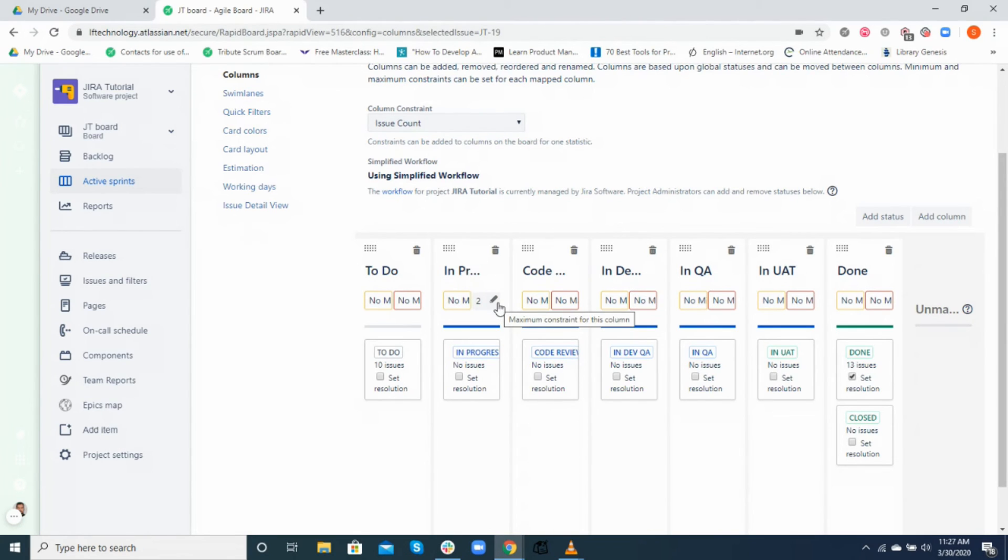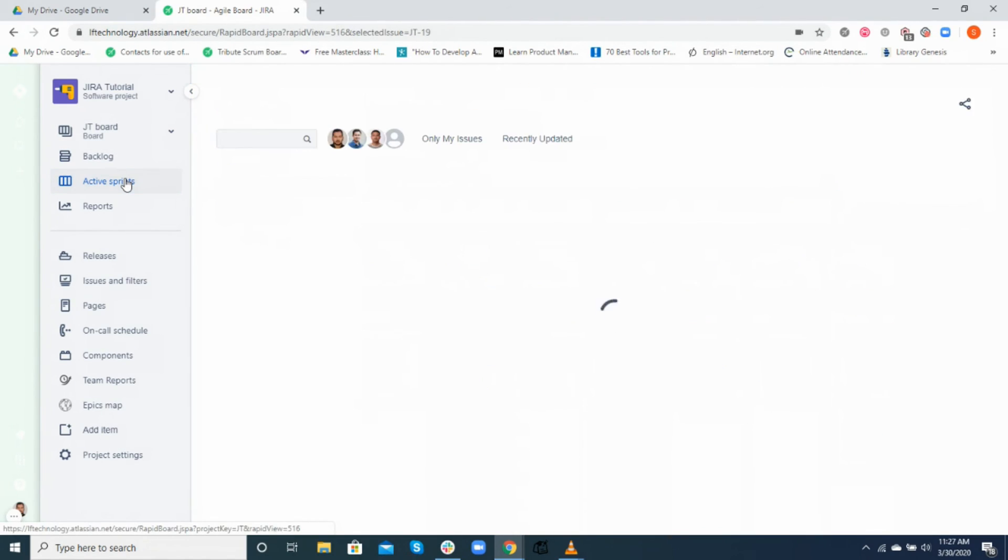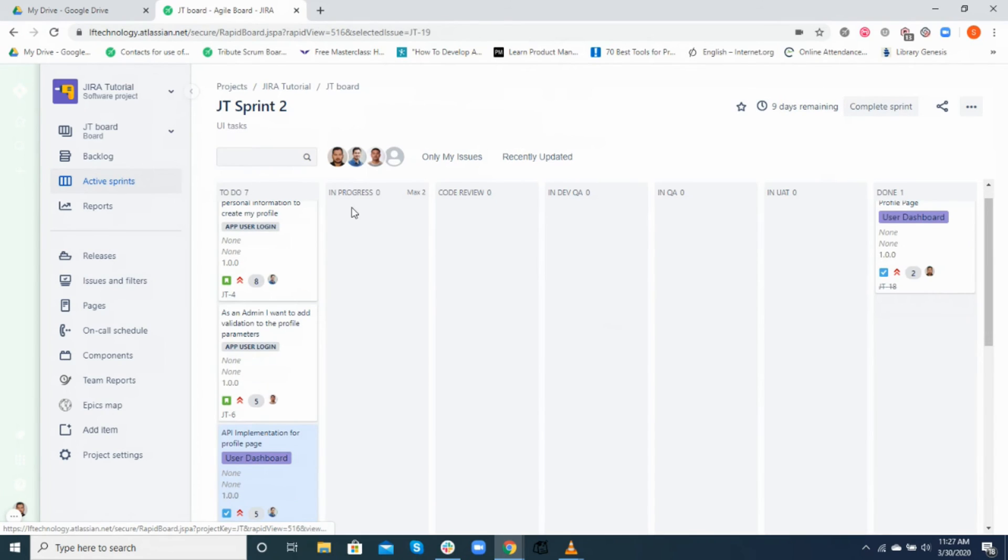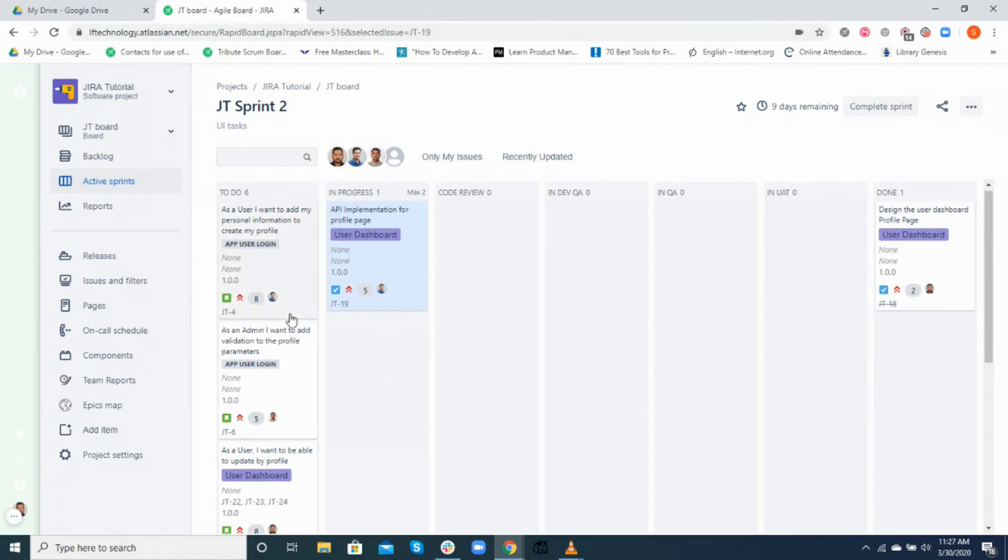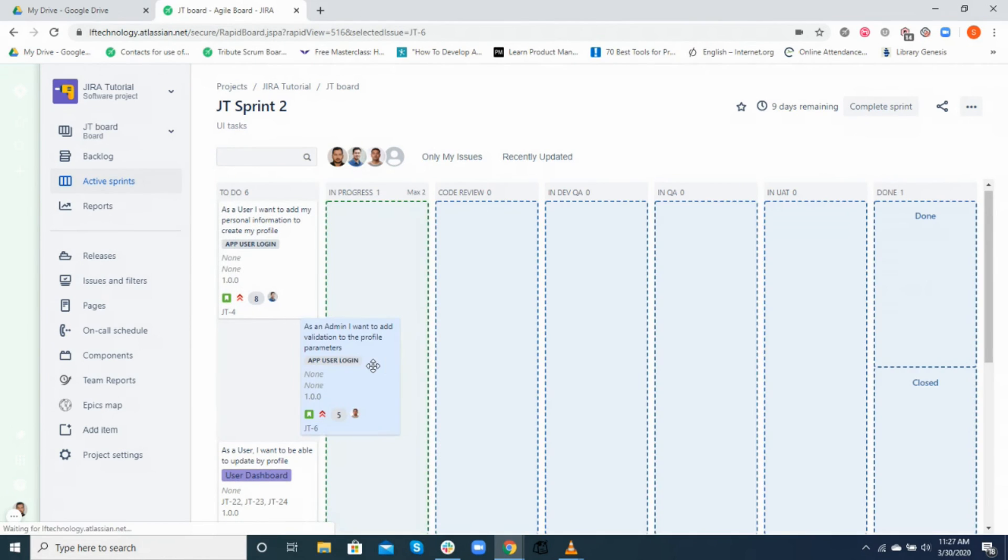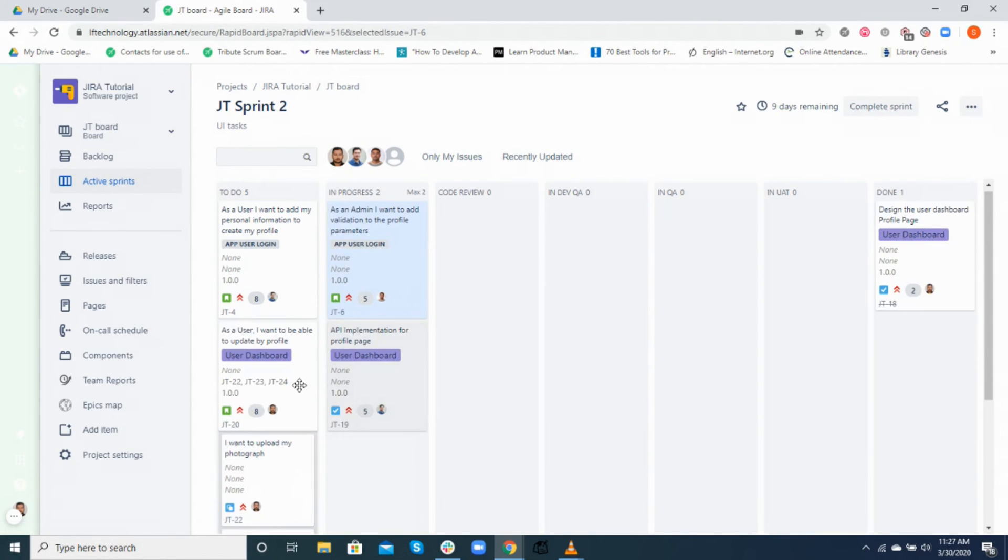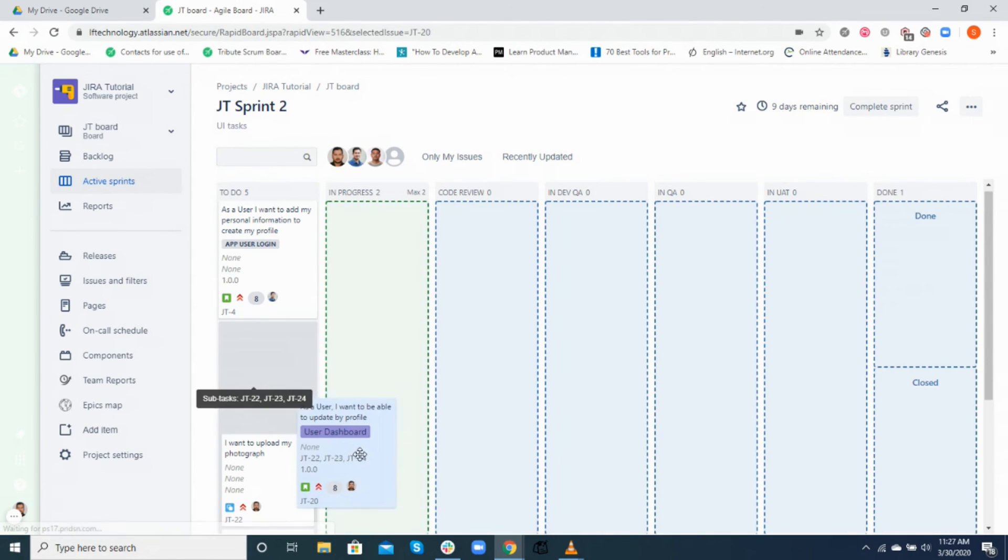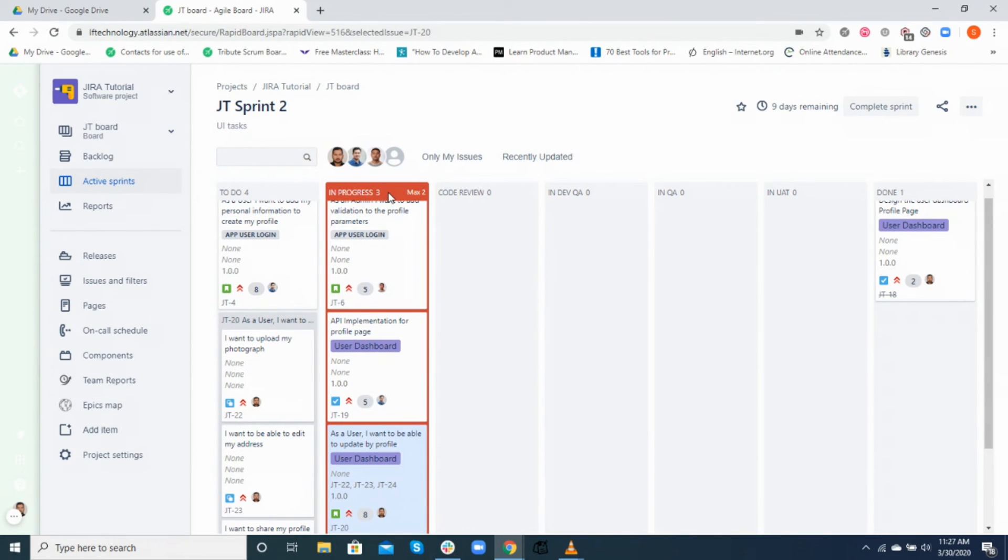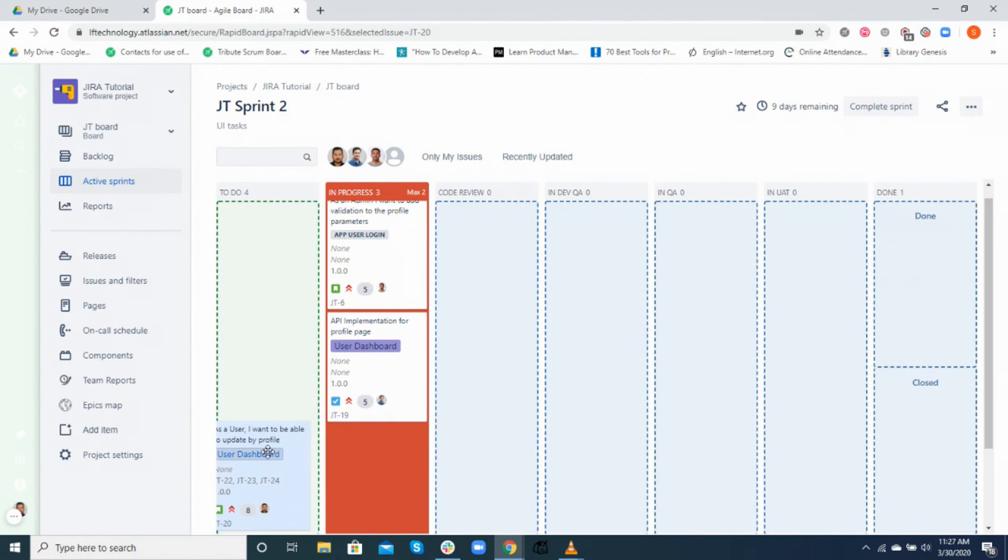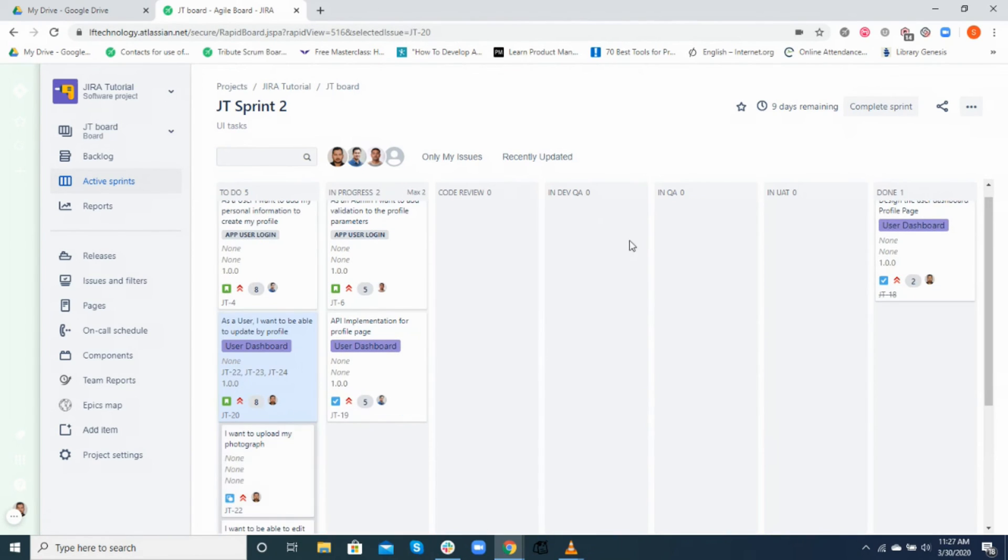This is usually termed as column constraints. You can define both the minimum and maximum count of issues in each column. In our board, the maximum WIP limit is set to 2 for in progress. If the number of tasks in in progress is more than that, the column is highlighted in red to show that your team has crossed the WIP limit. This really helps in visualizing if the team is over capacity.